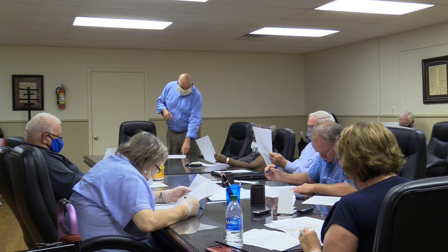And then on the lower left corner, that re-roof summary, we have defined how much of those costs are each to those projects. We related our fee on that project and divided it by the same ratio that the contract is, so we're just sort of fairly distributing how our fee works for those jobs in order to arrive at a figure that can be counted against the original $2 million obligation to Osceola, so that we can arrive at that figure. So that's $847,308 that remains to Osceola. We carry that on over to the right-hand side. You can see that that is an amount that is earmarked for Osceola that we're accounting for.